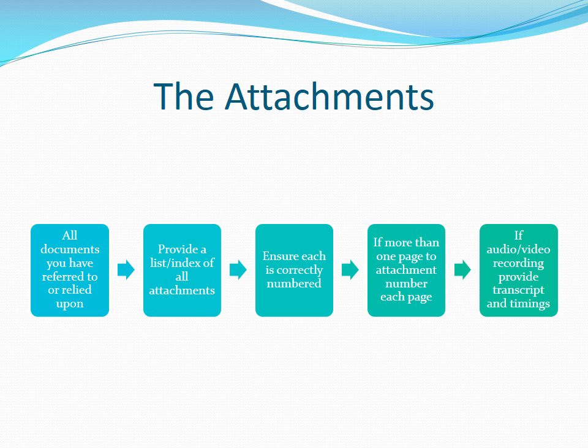Where possible in your submission, when you refer to a specific part of an attachment, such as a clause in a contract, it is recommended to quote the exact verbatim in the body of the submission. This again allows the adjudicator to more readily follow your submission without having to flick between pages.